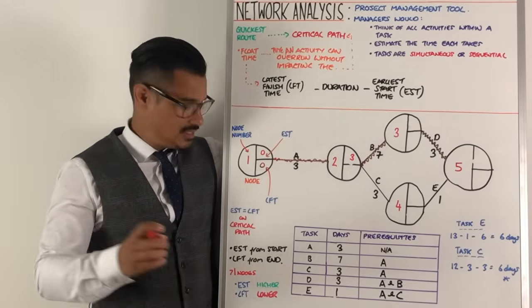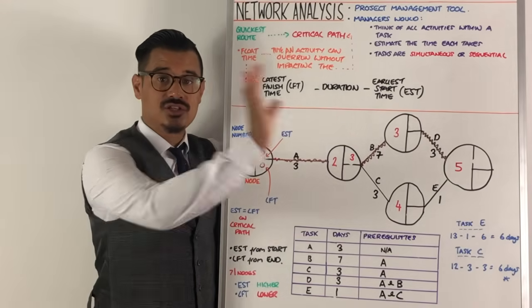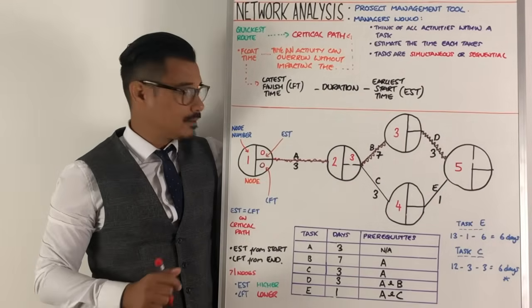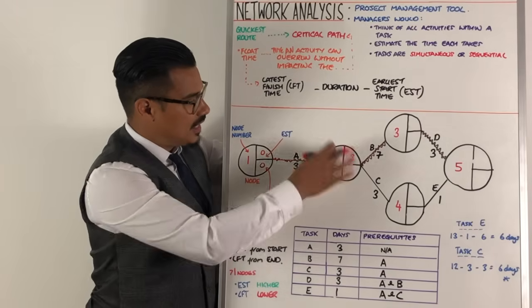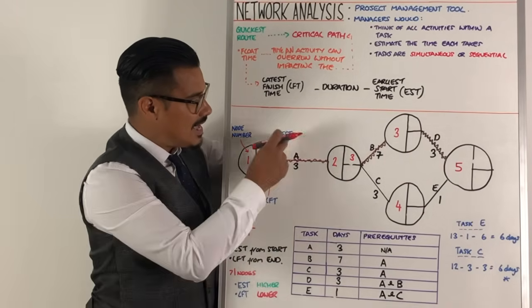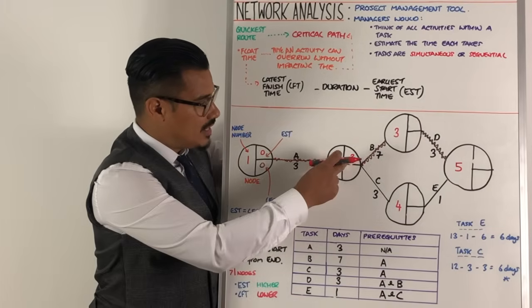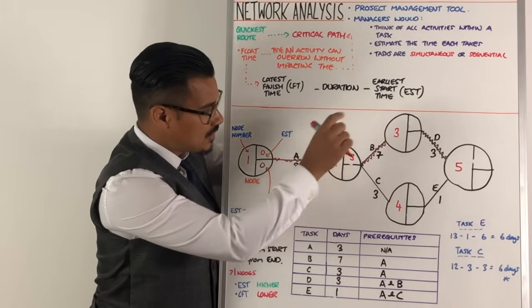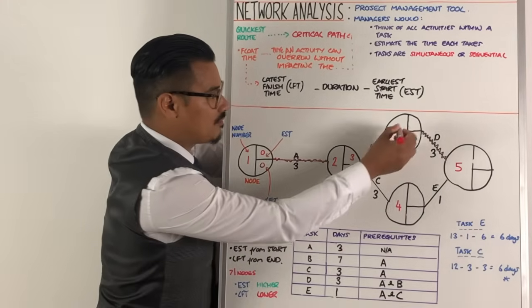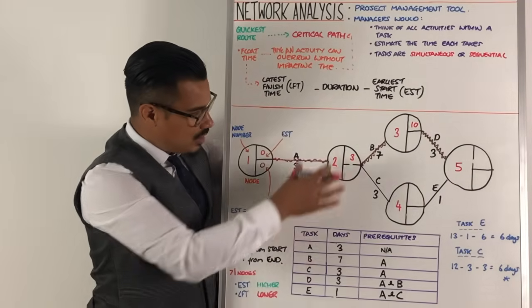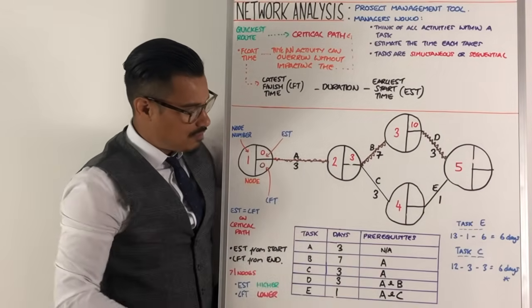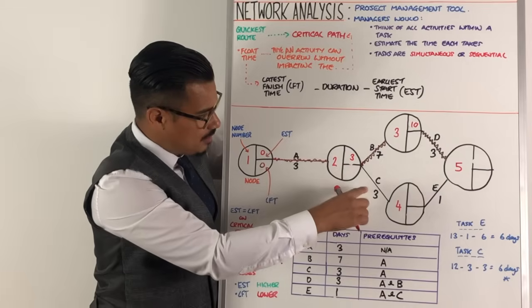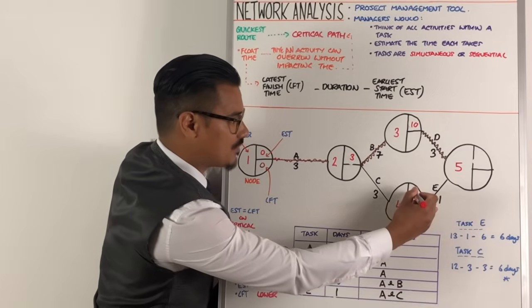The key thing to recognize with network analysis diagrams is that when you're calculating the EST, you move from start to end. And when you calculate the LFT, you move from end to start. So zero plus three, because task A is three days, it came to three. Now we're going to calculate the EST, the earliest start time for node three. Node three is being connected by task B here. And B lasts seven days, and it can't happen until A is finished. So A is finished now at node two. So we start B. And three plus the length of time that takes is seven. Three plus seven is 10. Then if we go the other way, because B and C both need A to have completed, so they could theoretically work simultaneously, then we can do for C. So three plus the length of C is three. So three plus three is six.